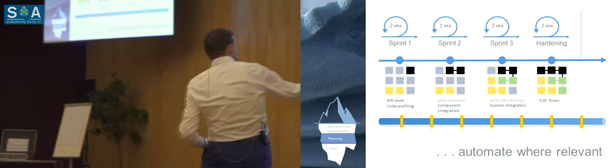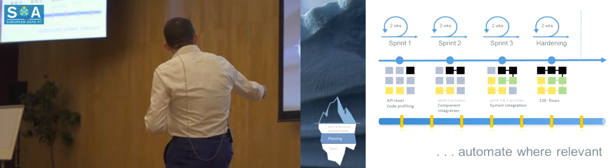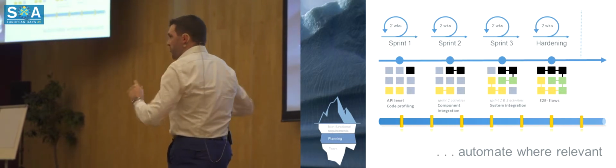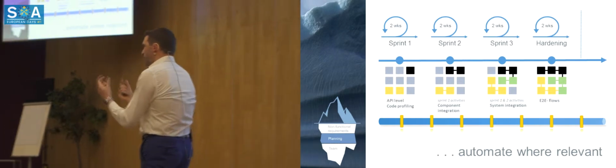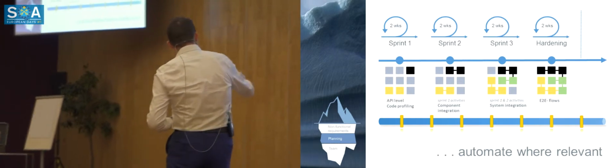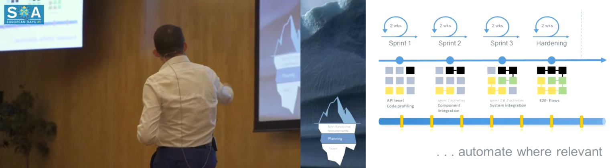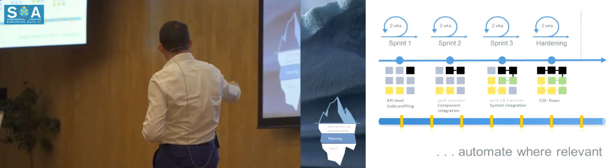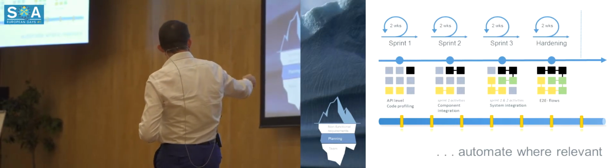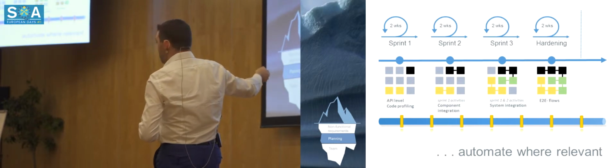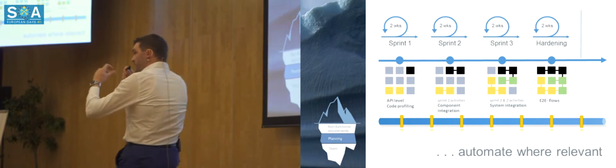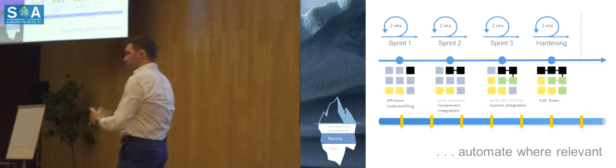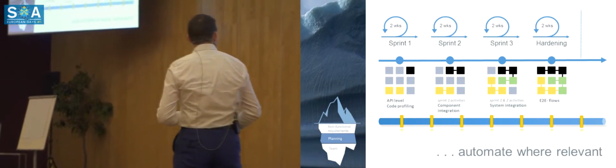And maybe one thing about the previous thing. In every sprint, you need to foresee what I call a tax of story points. Because if you met the performance requirements in sprint 1, you still have to meet them in all other sprints. So you have to foresee in planning your sprint some story points to redo your performance test.